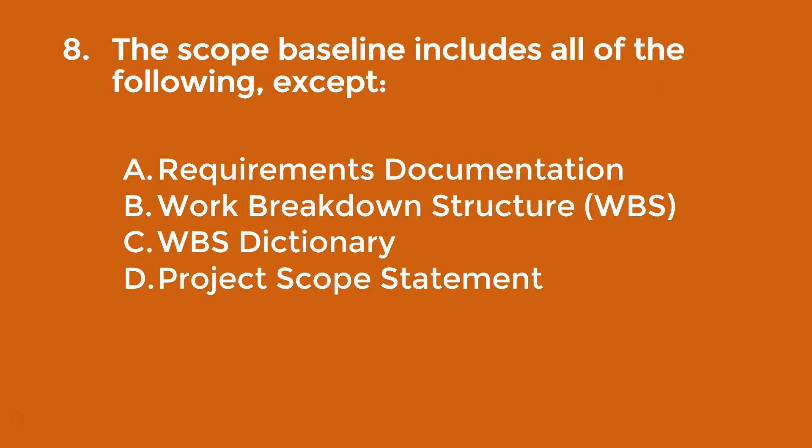Question eight: the scope baseline includes all of the following except what? The answer is requirements documentation. The other three options are included in the scope baseline.